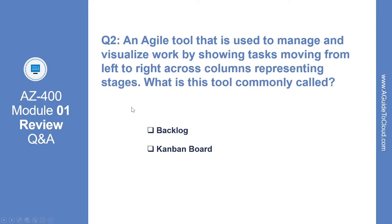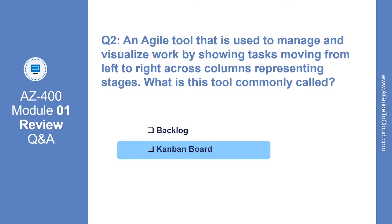Question number 2: an agile tool that is used to manage and visualize work by showing tasks moving from left to right across columns representing stages — what is this tool commonly called? The correct answer is Kanban board. A Kanban board lets you visualize the flow of work and constrain the amount of work in progress, turning your backlog into an interactive sign board providing a visual flow of work.